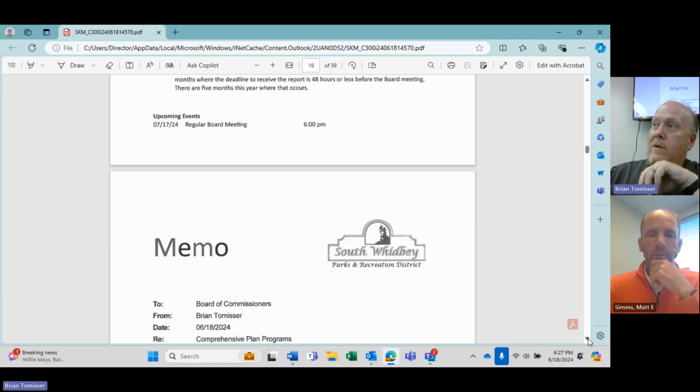I did get from the county after our meeting just yesterday, I think, basically what they need in the site plan, and it was quite an extensive email, so I can forward it. What the county has told us is that we have three site plans for you, we need one. Let's do that first. And then after that, we'll get you the to-do list for what you need to get the permit, and then you can work on getting the permit. There are some steps here that are fine. The bottom line is that we're keeping the conversation going. We've got regular meetings scheduled every quarter as a committee to keep the conversation moving forward. We're building a pool, and that's certainly overlapping this.